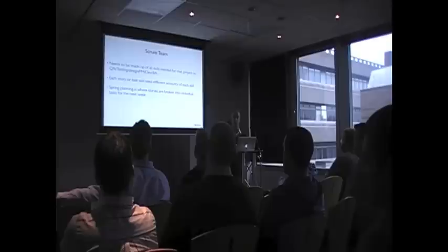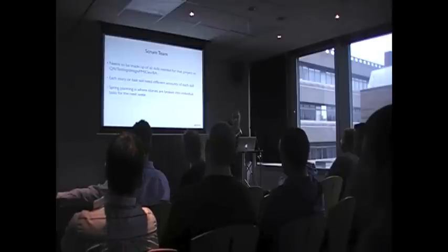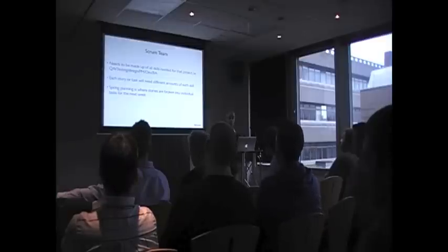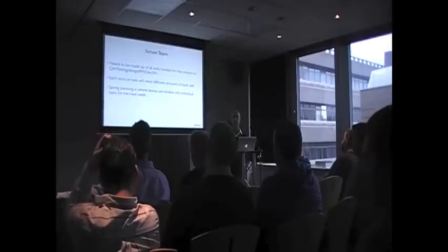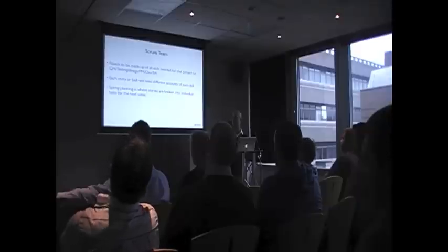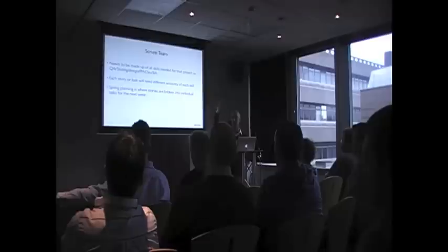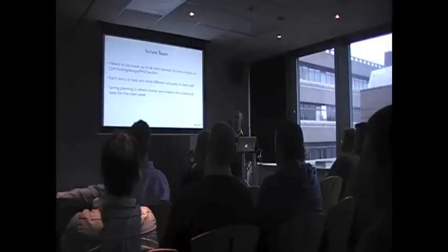We have one backlog that every project feeds into, and we have, as I said, the Friday meeting to decide on the priority of all the user stories across all the projects that we know are happening. So we have 3 or 4 projects running at the same time, and they're all in a big list. We sit down, we prioritise them. We know that 2 of the projects have got deliverable dates over the next couple of weeks. We know the deliverable dates for the other projects, so we move obviously the stories for the next week to the top of the list, and then we allocate those to the developers and work with the developers to actually estimate them at that point.